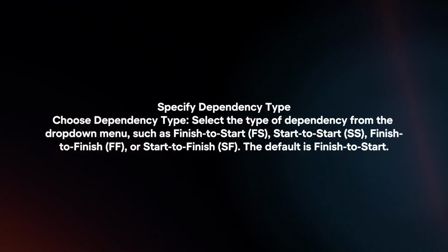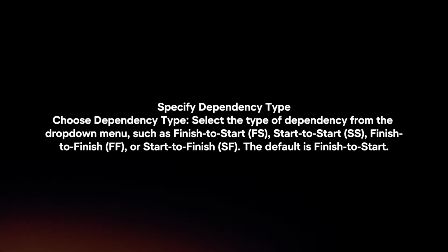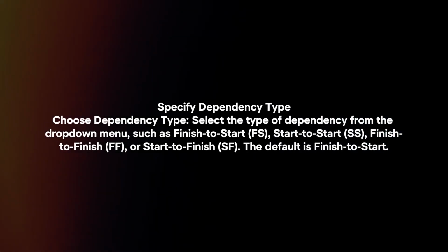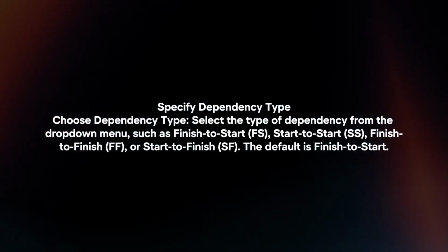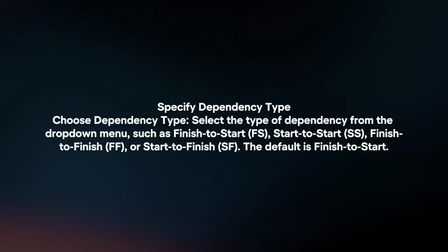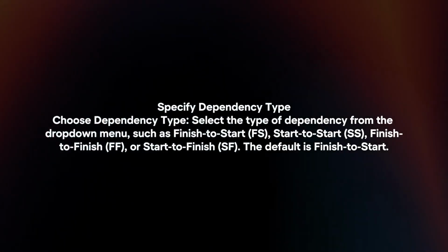Specify dependency type. Choose dependency type. Select the type of dependency from the drop-down menu, such as Finish to Start, Start to Start, Finish to Finish, or Start to Finish. The default is Finish to Start.